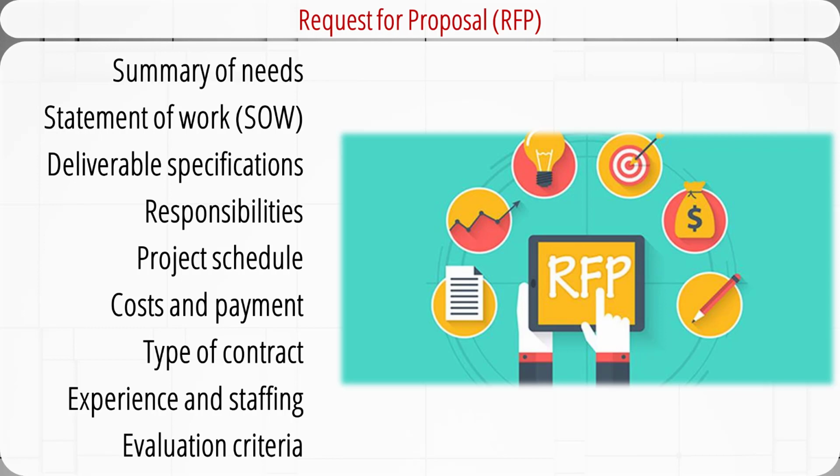The request for proposal needs to define the responsibilities of contractors and the customer. Who is responsible for what? What are the limits and exclusions, etc.? The project schedule, milestones, project budget, and payment method should be specified, and they can be used to control and evaluate project progress.